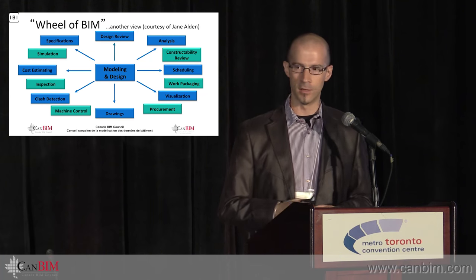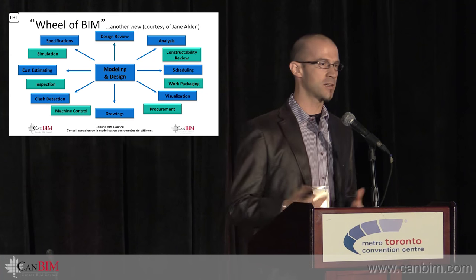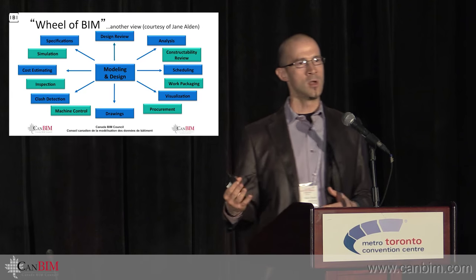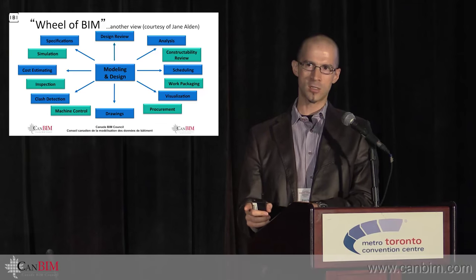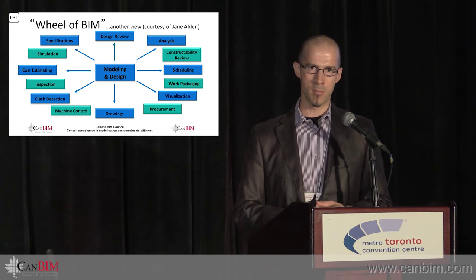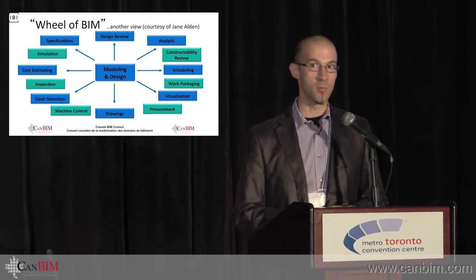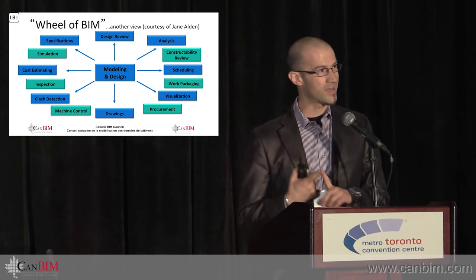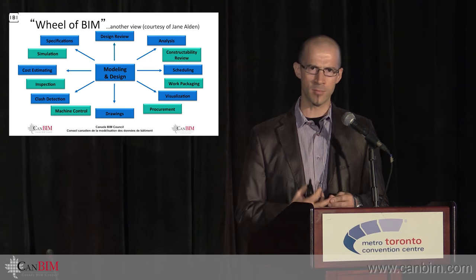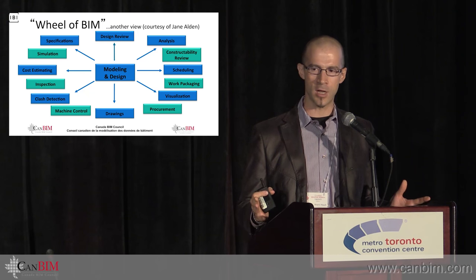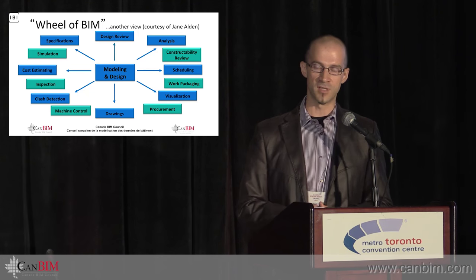Then Jane, my colleague, came along and said, let me take your BIM wheel and turn it into a little more civil focused. So she expanded a little bit on it, but exactly the same concept. So there's no one right answer. The point is, scoping is critical. Am I going to take my BIM model and have a goal focused specifically on machine control and hope to be able to drive our excavation machines on site based on content pulled in from the BIM model? If so, that sounds pretty awesome, but we better know how we're going to do that. The model better account for that as early as possible, and somebody better be testing that. That project BIM lead better be ensuring that throughout the duration of the project, it's being set up to actually facilitate such an item.